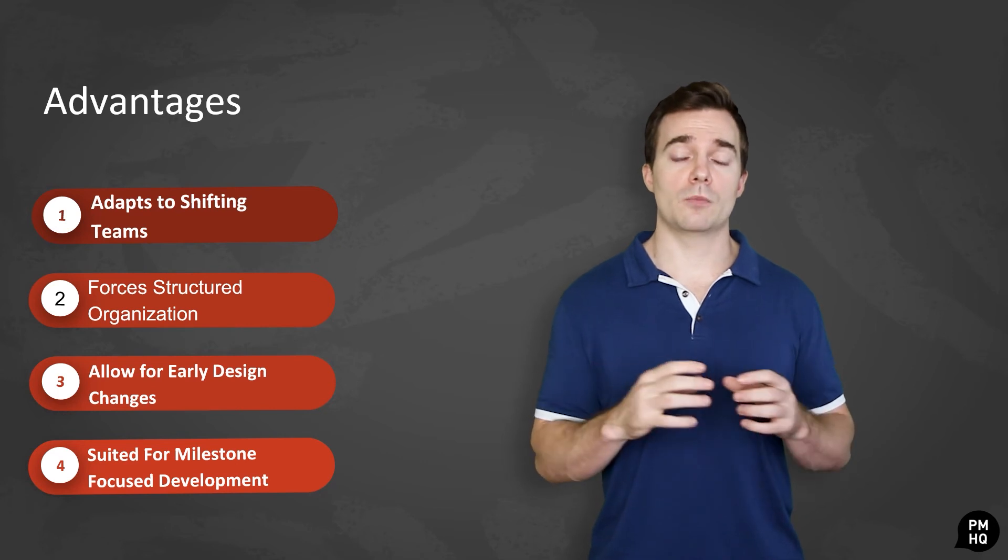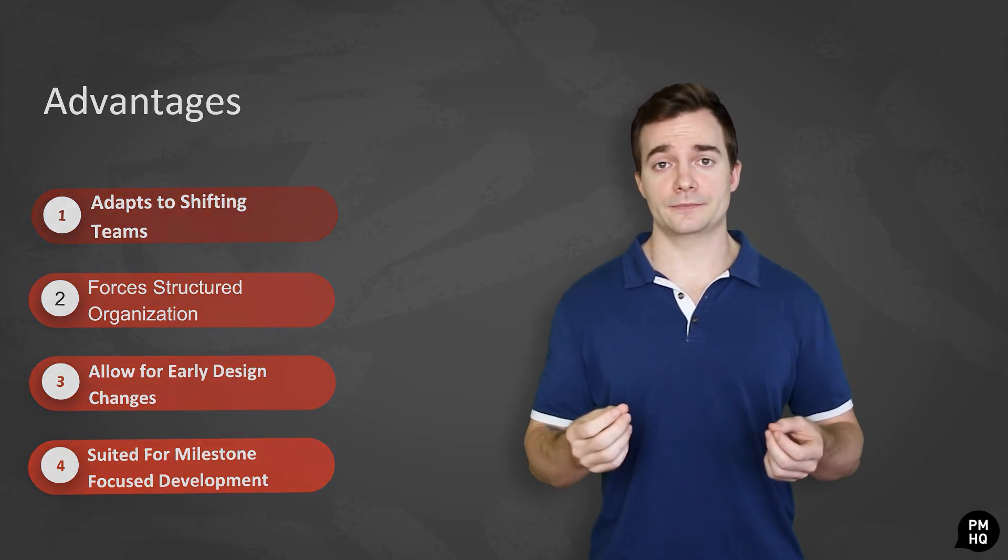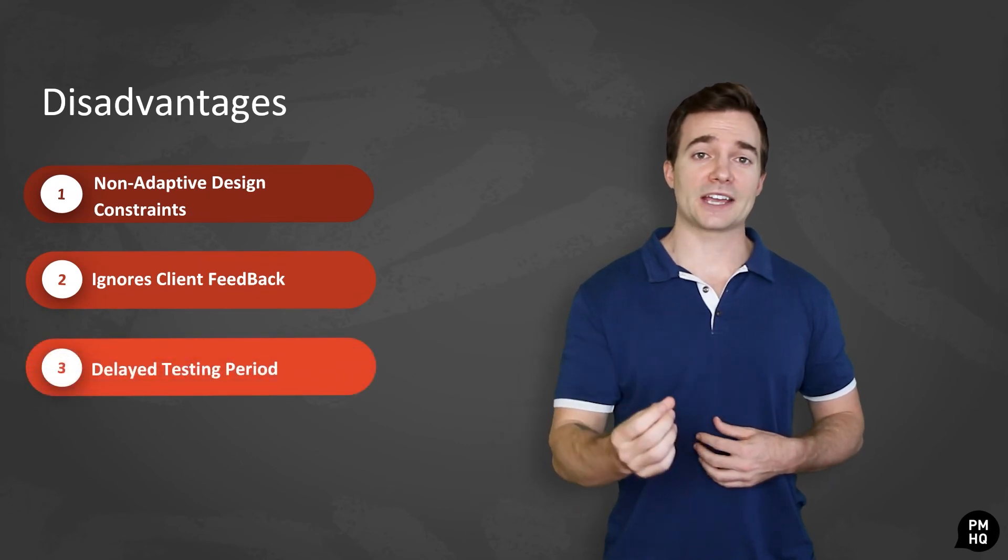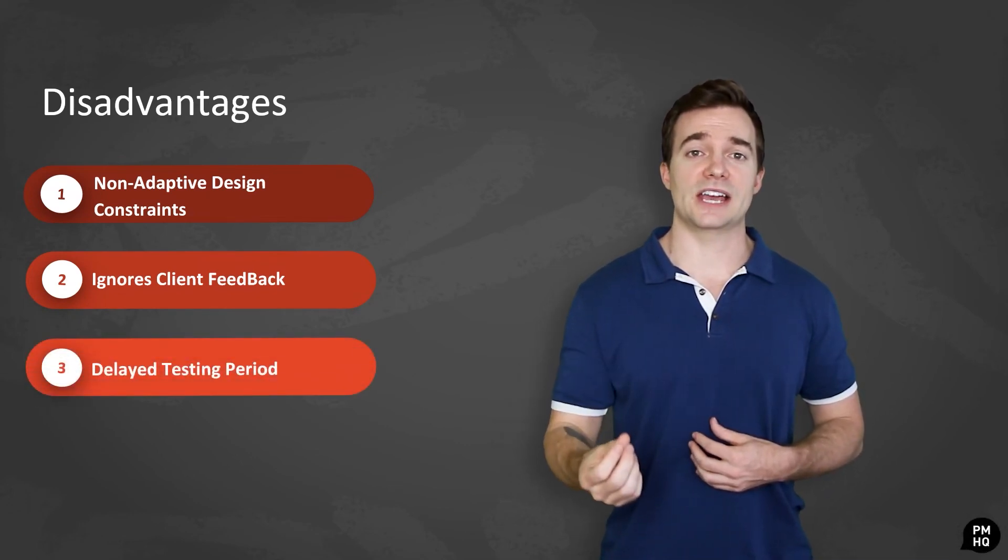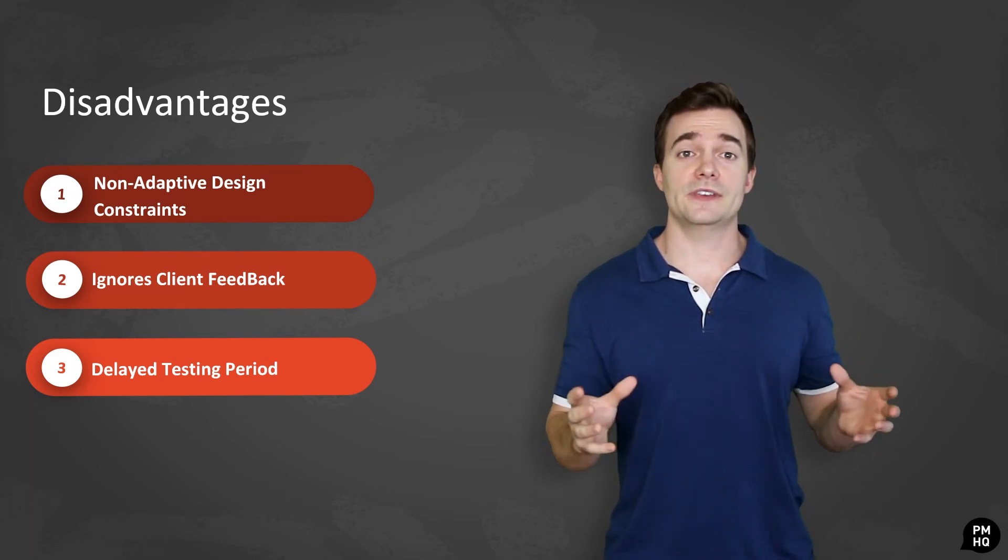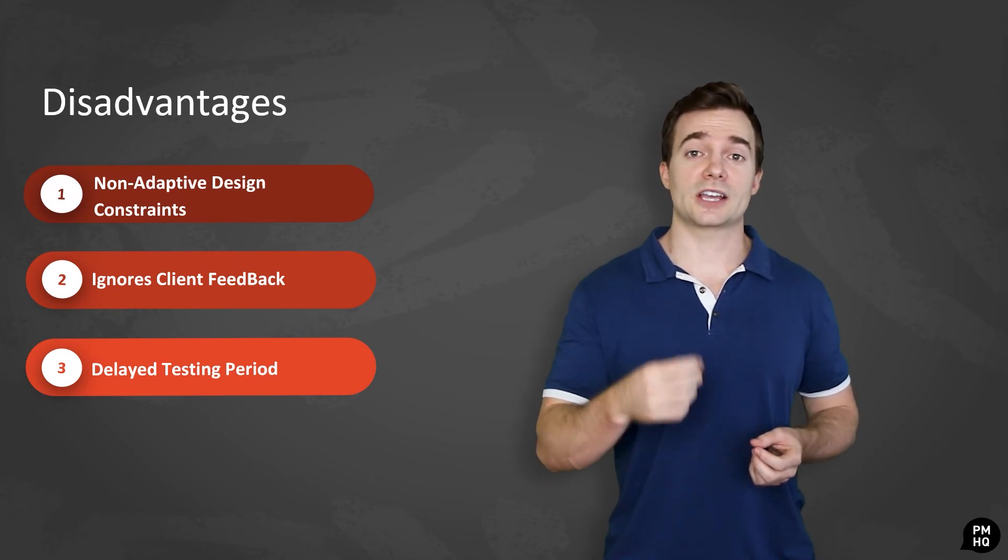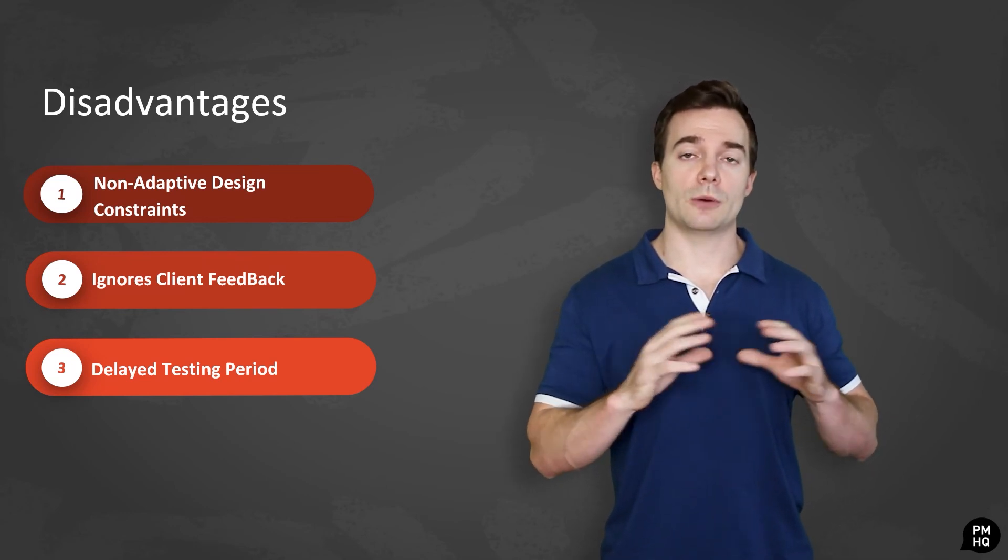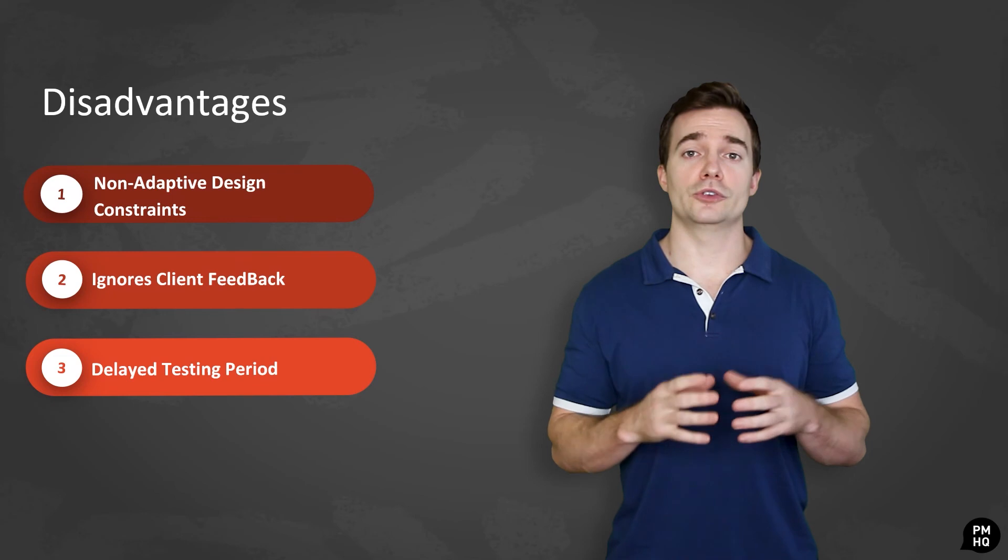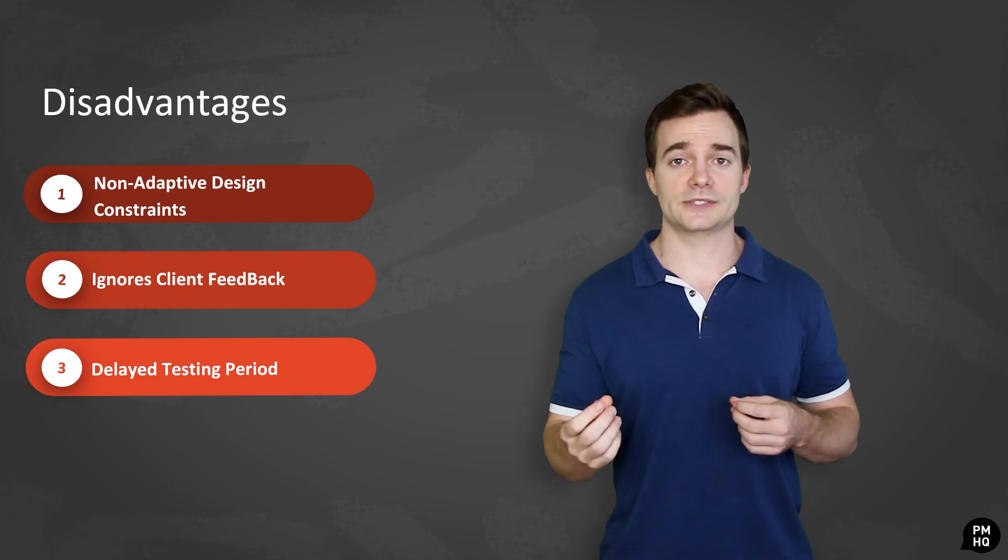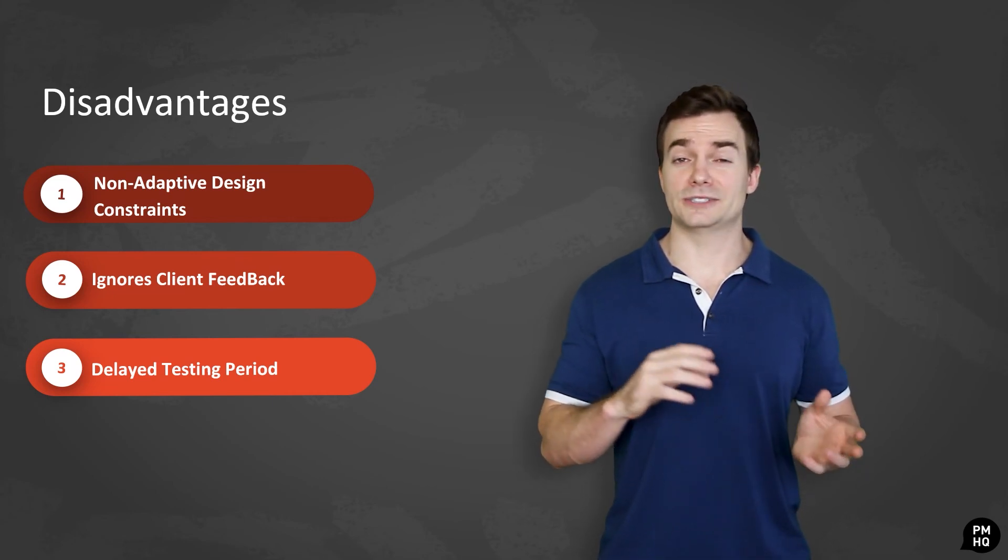The waterfall methodology does not come without its drawbacks. The process of gathering requirements from customers is a really tough process from the get-go because customers may not necessarily have a good sense of the final product, even if you give them wireframes and mockups. Because of this, there is a good chance that the customers will be unhappy with the final product since they can't see what is being delivered until it is almost finished. The waterfall plan doesn't take into account users' evolving needs. So if the team discovers that the user demands different changes later in the process, it's very difficult to go back, especially all the way to the beginning.